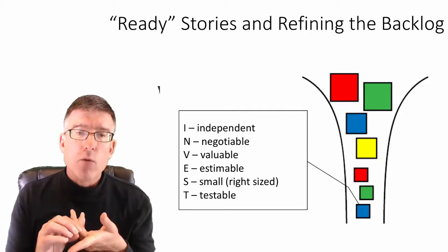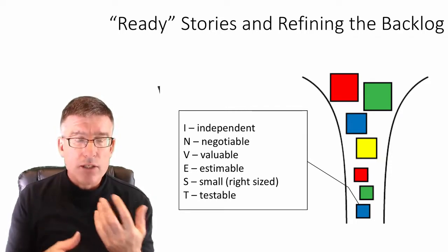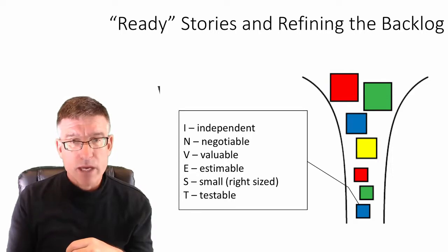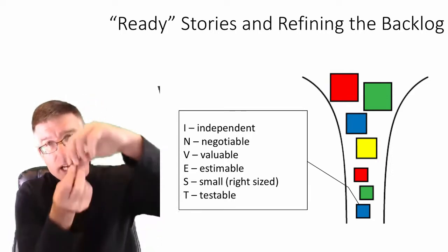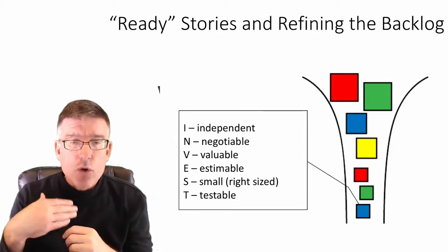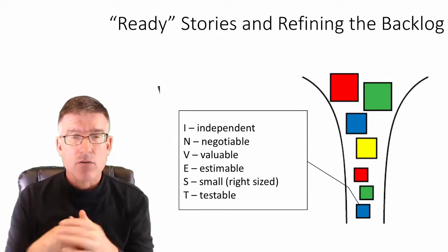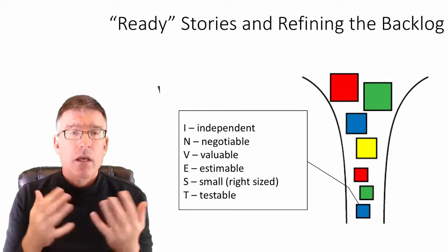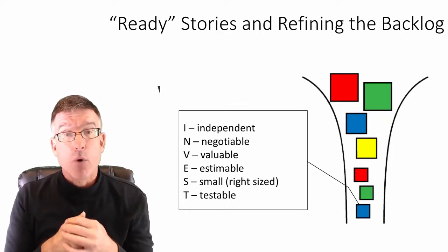Typically, this is where we're trying to avoid CRUD stories or component-based stories. We're still trying to get that thin end-to-end slice if we can, so we can show the end-to-end functionality to our stakeholder. The E here is really important to me.